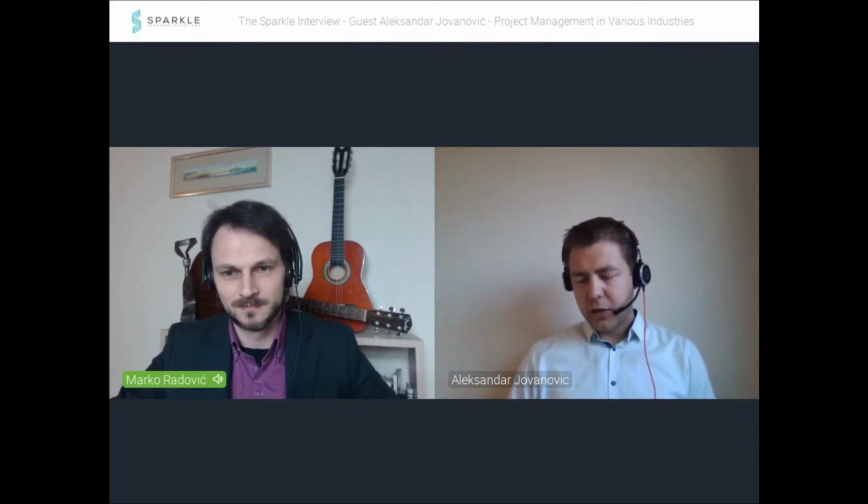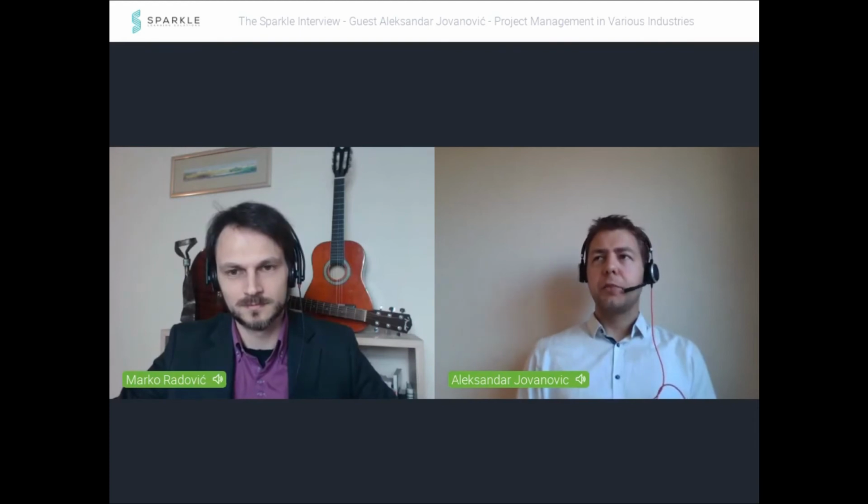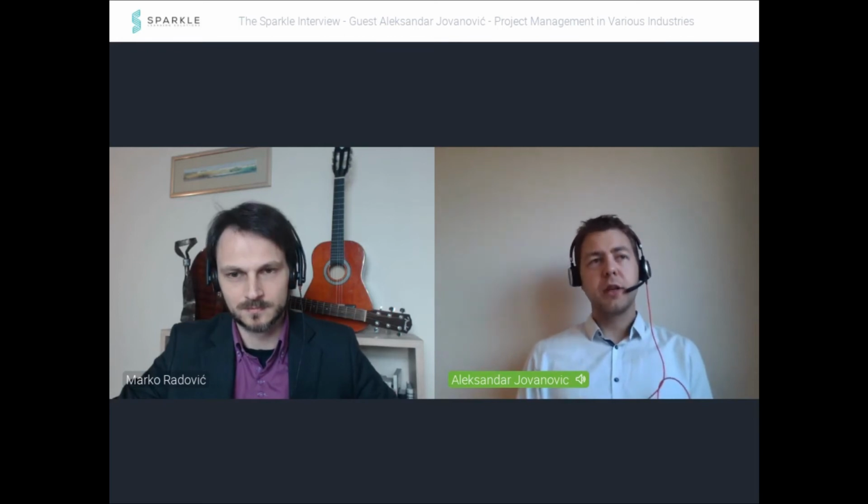What I like to do is create a common repository that goes broader than your specific project. It goes up to the level of the team of project managers that you might belong to, so that common folder would contain all the lessons learned. What I like to do in my team is create a knowledge sharing session out of all those lessons learned.